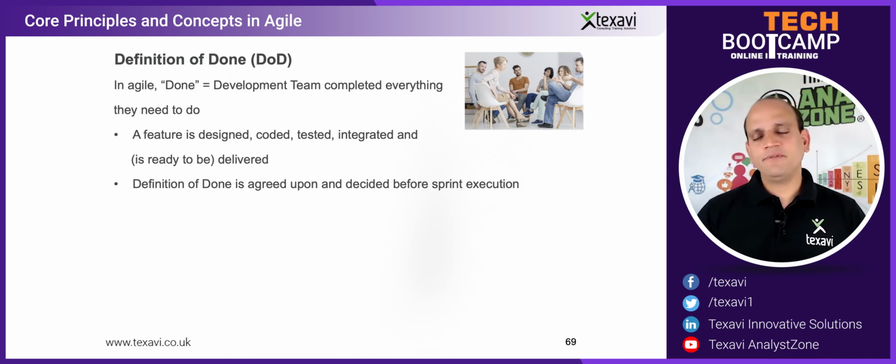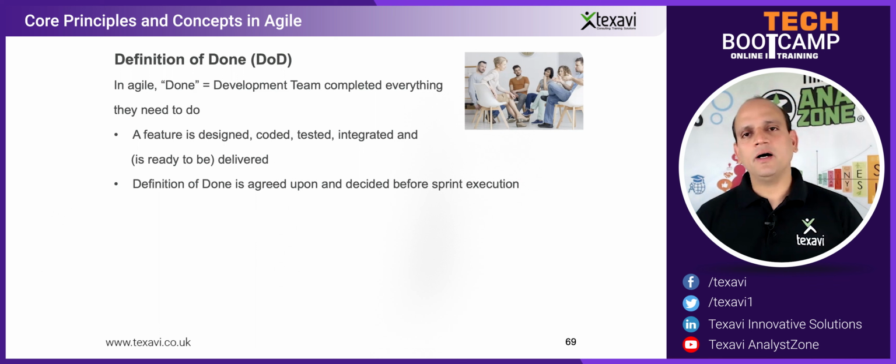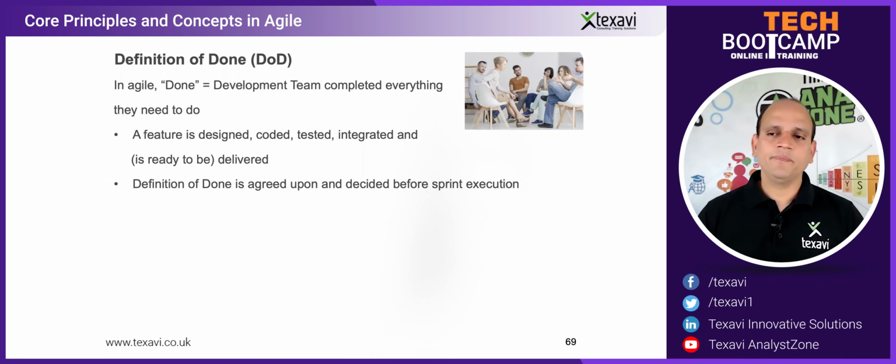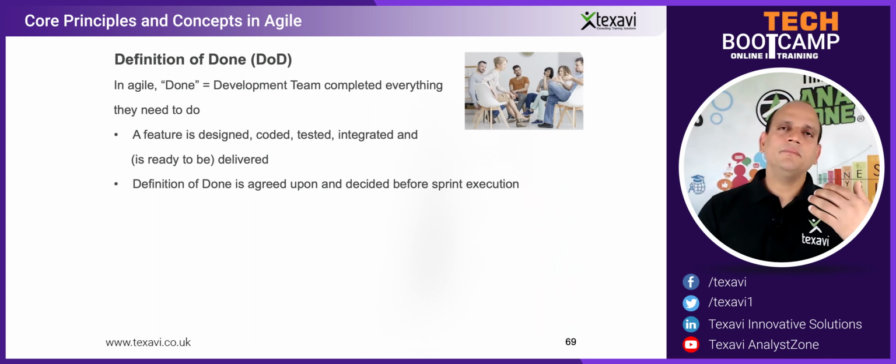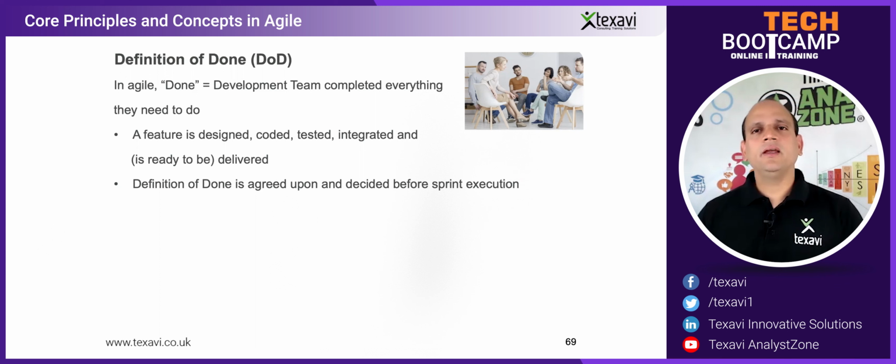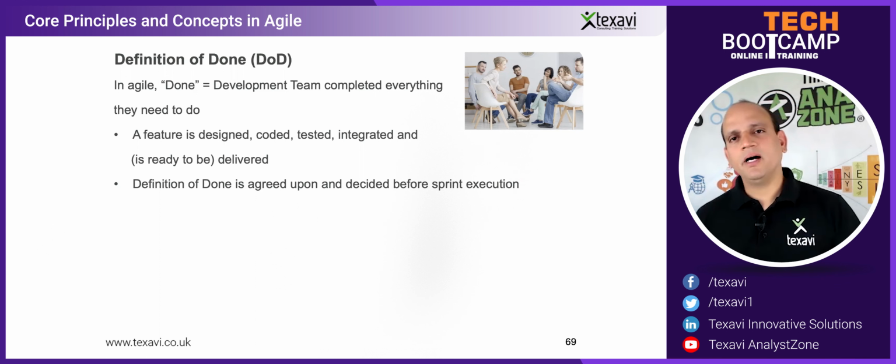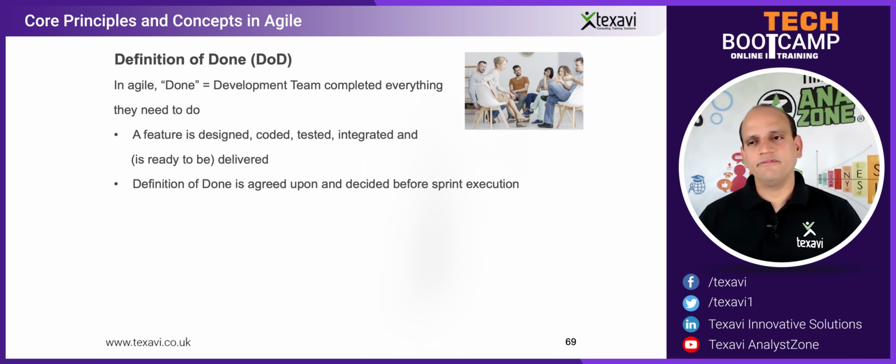So for example, the definition of done for the project that we were talking about, the mobile accessories website, could be that the release plan says by the end of November we want to have the catalog and functionality ready. So that's the release plan. With that in place, what we need to work back to is the end of this coming sprint. Let's say the next sprint is going to finish by November 1st. We're starting Monday, and it is 2 weeks roughly, so we'll say it would finish by the 30th, or the end of October.